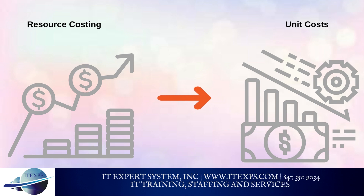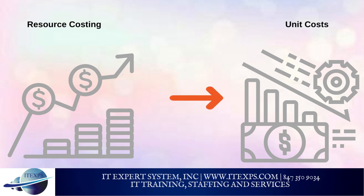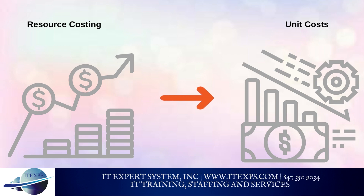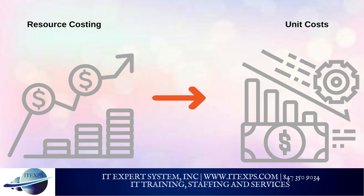Unit Costs. Small or simple projects can be evaluated using a cost per unit that is characteristic of the project. The characteristic unit is a measure of the size of the project indicative for the particular project — it might be a cubic foot, a square foot, or a workstation. Typical applications are for building costs, paving, renovating, or for standard systems such as data processing. Costs are a dollar amount per unit. To get the total cost, you decide how large the building or surface is, or how many people will be working, then multiply that by the unit cost. You can get typical unit costs from prospective suppliers or from industry associations.